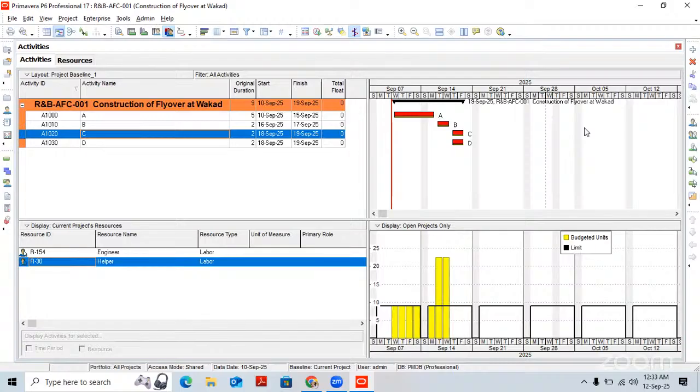When you check the critical activities, you will come to know that some activities are unnecessarily coming into the critical path. Then you can change that critical activity to a non-critical activity by changing its predecessors or successors. Or sometimes you will find that some activities are non-critical, but they should be critical. Then again you have to check the predecessor and successor, and make them critical. This is totally as per our thinking and as per our need of the project.